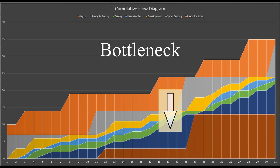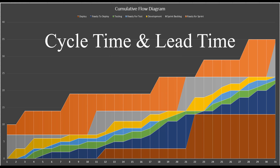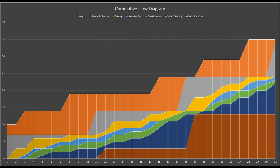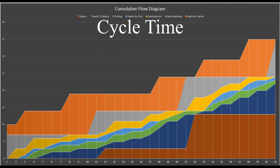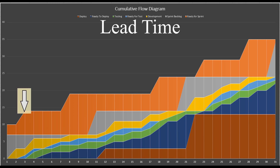It also helps us look at cycle time and lead time. Cycle time in this instance will be anything from in-progress to done — so from development all the way to ready for deployment. I'll count those things and that will be my cycle time. The other thing is lead time: how long is my lead time? Lead time is from the first state all the way to the last state.